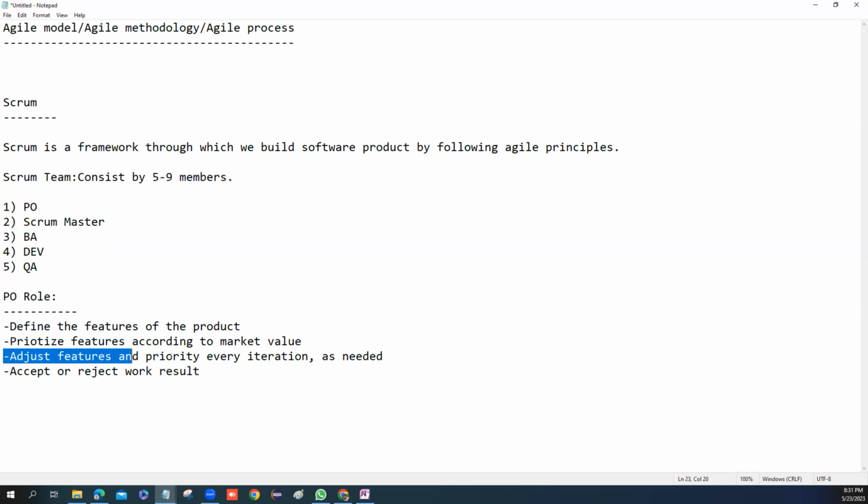It is like in one single sprint, which story or which features they will start with. I mean, they will start work on it. He is the guy who is going to decide. Okay, like they have 100 features for this project. So before the sprint starts, he is the guy who will decide in this coming sprint which story will come first and which story will go next.